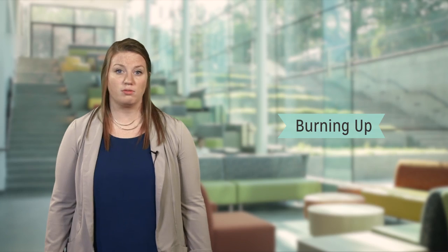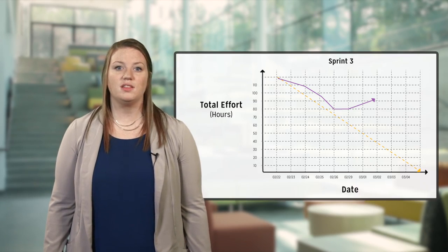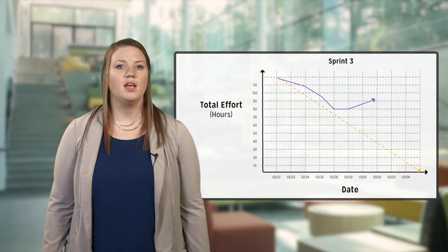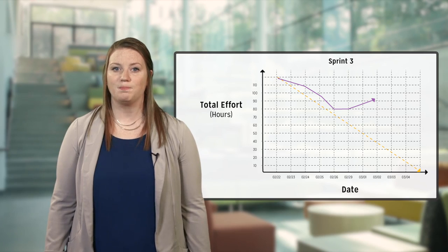But what if your burndown starts burning up? This happens when you are adding more tasks than you are completing or removing. This is an indication that your team didn't do careful iteration planning when breaking the user stories into tasks. Maybe there were tasks that were overlooked or forgotten. Obviously, this isn't a good situation to be in, especially if it is occurring late in the sprint. You can usually avoid this situation by spending adequate time breaking down the user stories into tasks.